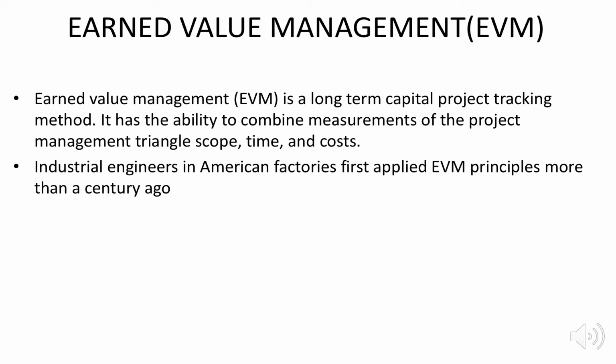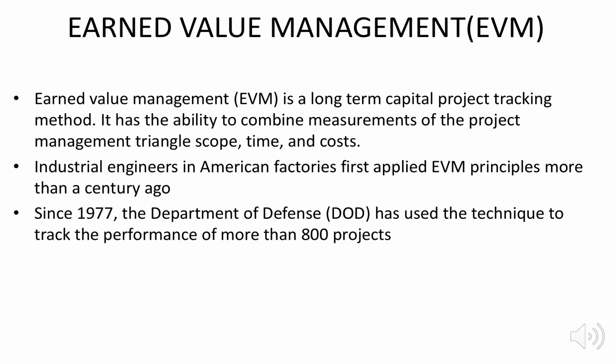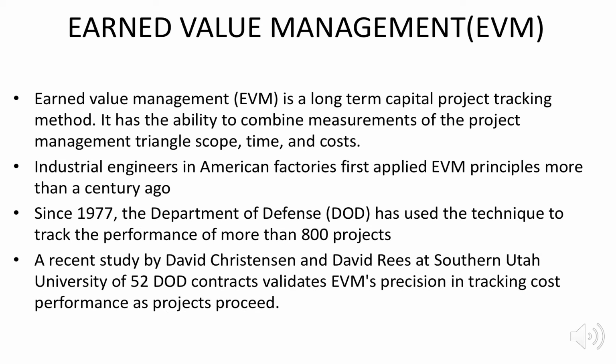Industrial engineers in American factories first applied EVM principles more than a century ago. They have been using EVM principles for more than a century. Since 1977, the Department of Defense (DoD) has used the technique to track the performance of more than 800 projects. A recent study by David Kristen and David Rees at Southern Utah University of 52 DoD contracts validates EVM's precision in tracking cost performance as projects proceed.